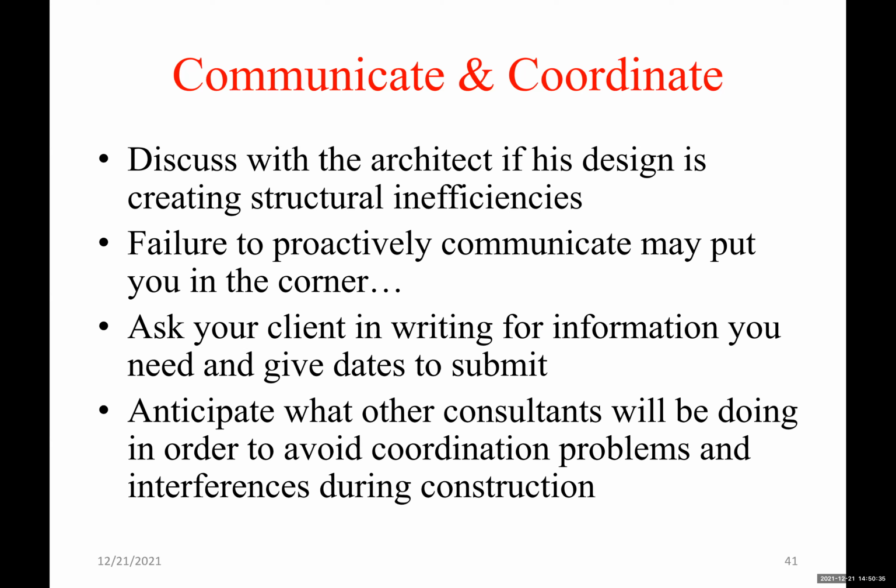So somebody may tell you, well, you should have told me this earlier. I should have changed my design. So maybe changing their design would be simpler than changing your design. Okay, so that's why it's important. Ask your client in writing for information you need and give dates to submit. Okay, that's important, and in every stage of the project.